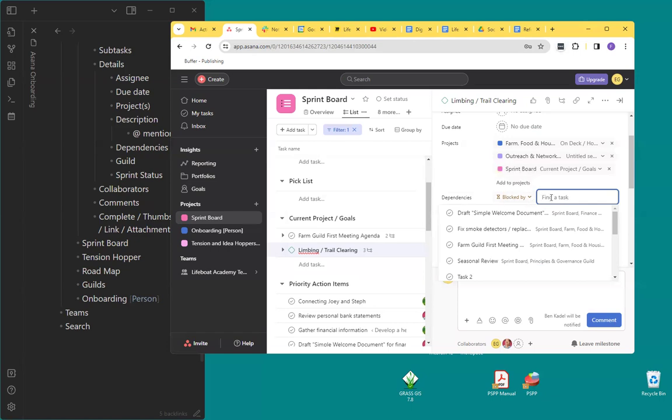So you can add a blocked by in the editing, blocked by draft. That task basically is hidden until the preceding tasks are done. And once that task is done, it pops up. It brings your attention to the fact that it's unblocked by a previously completed task.